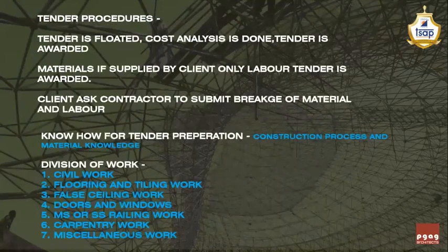Now, tender procedures: the client floats the tender. He does the cost analysis, where as a designer you play a part by comparing two or three cost estimates with the realistic cost, which you are already aware of, and then the tender is awarded.